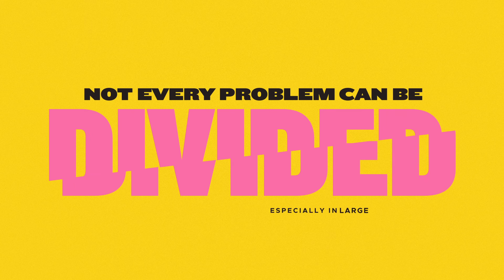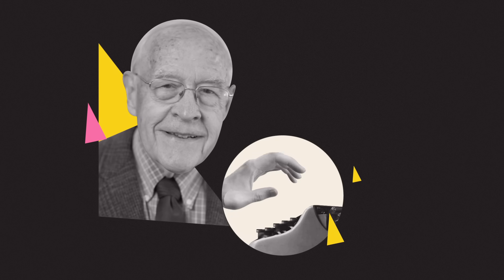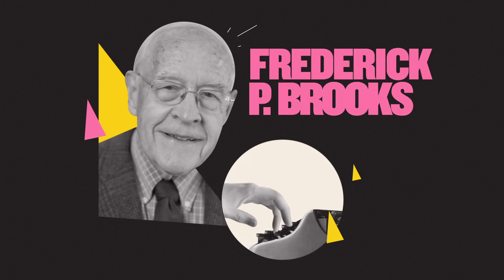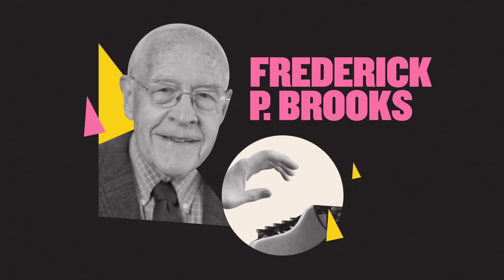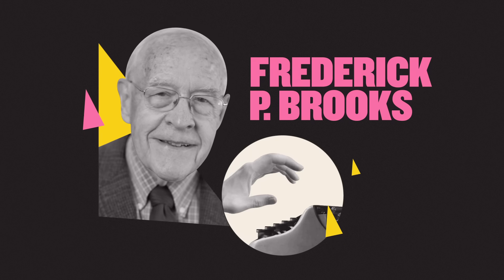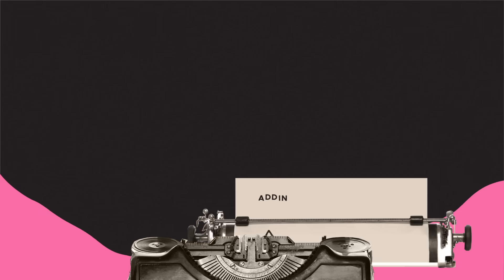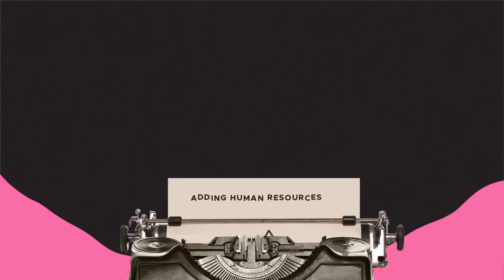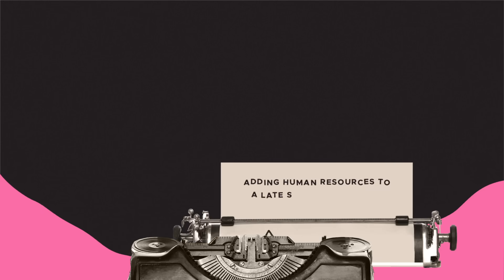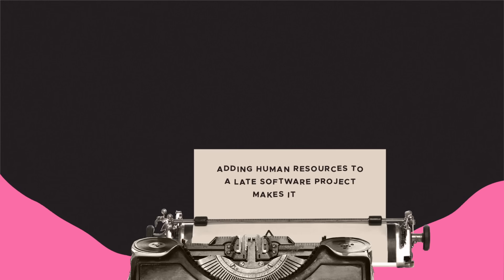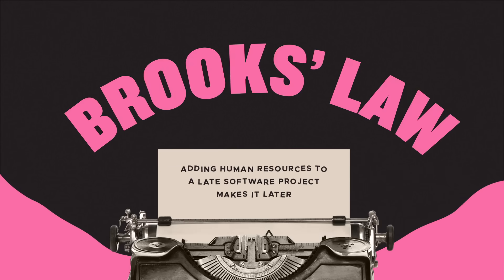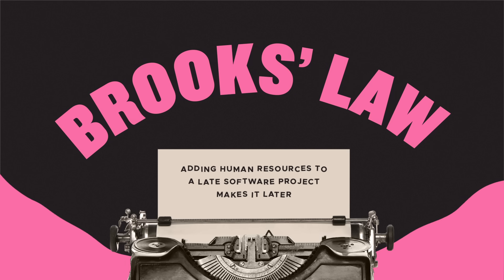And this is especially true in large projects. In 1975, software engineer Frederick P. Brooks published an essay entitled The Mythical Man Month, in which he states that adding human resources to a late software project makes it later. This has since come to be known as Brooks' Law.